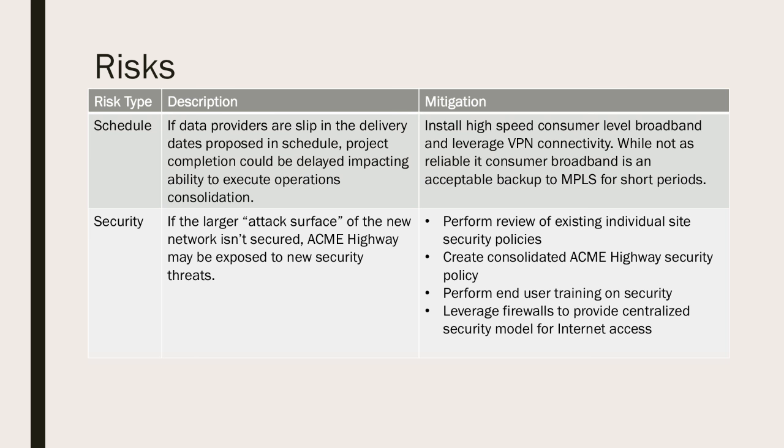One was the schedule. One of the things I've experienced when I've rolled out similar projects is that the telephone providers, or what we sometimes call telcos, are notoriously bad at missing scheduled dates.